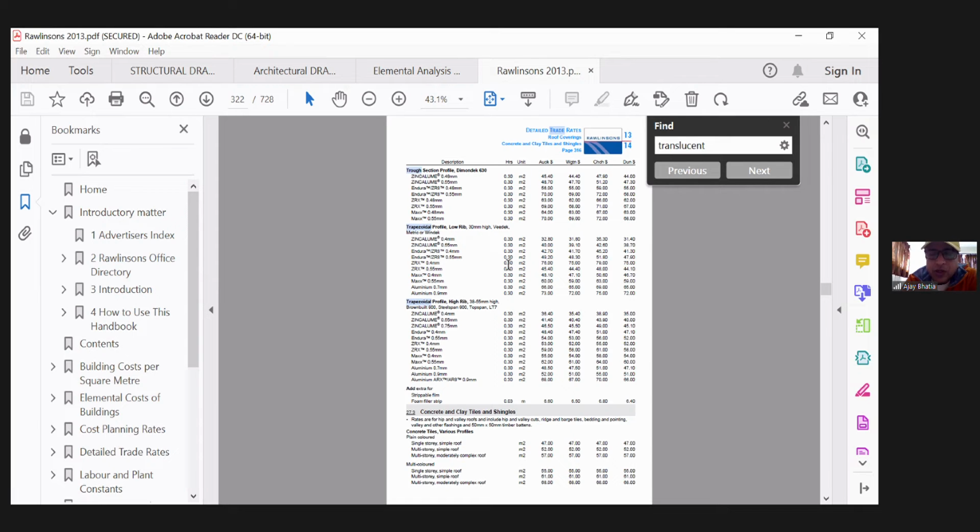So what you're doing is, your 6.01, you are doing the whole area. You don't do any deduction, and you do it for the whole roof. Basically, you create a rate for the whole roof, and then you add separately for 6.11 for translucent.